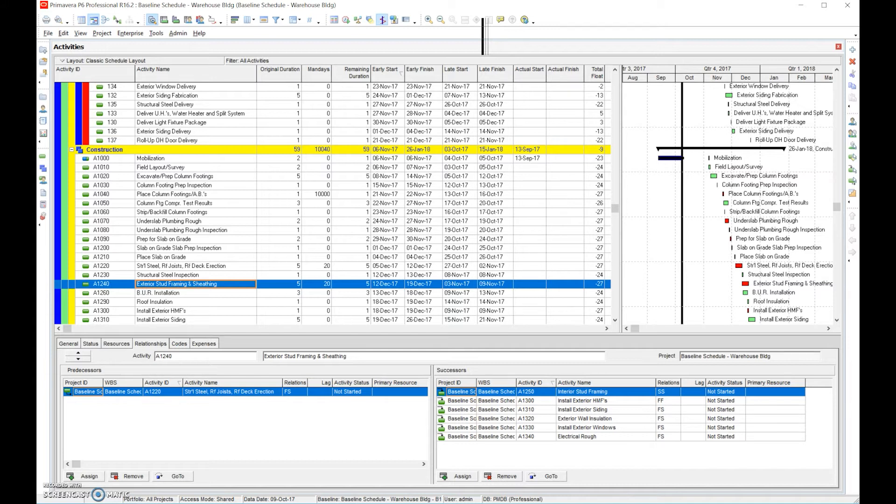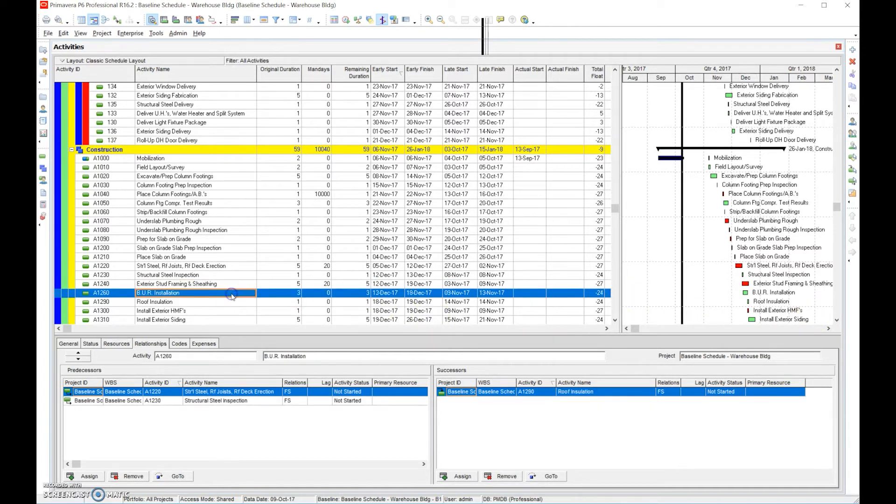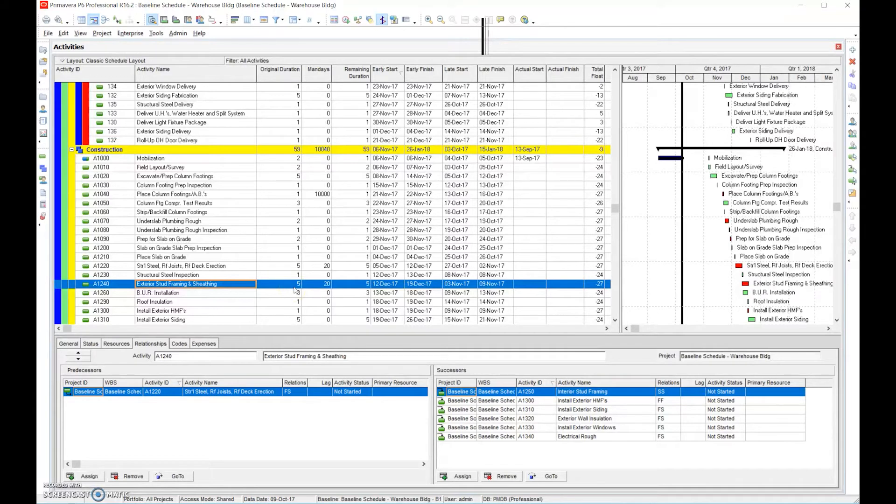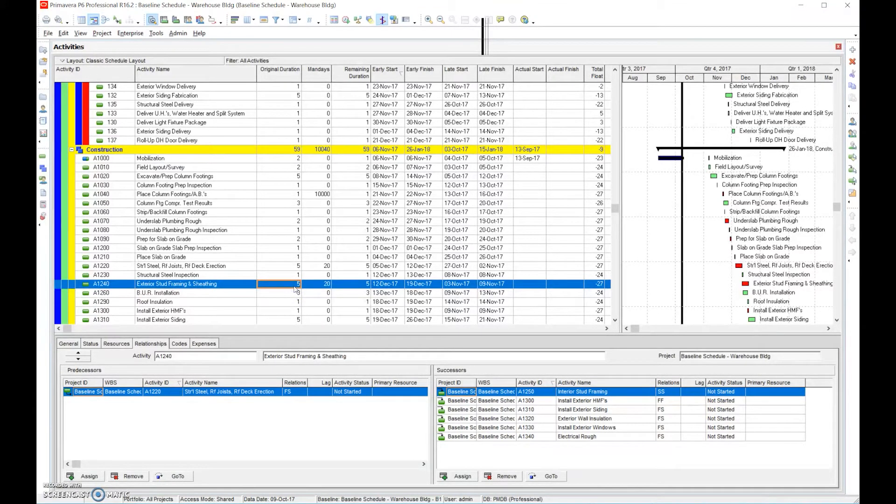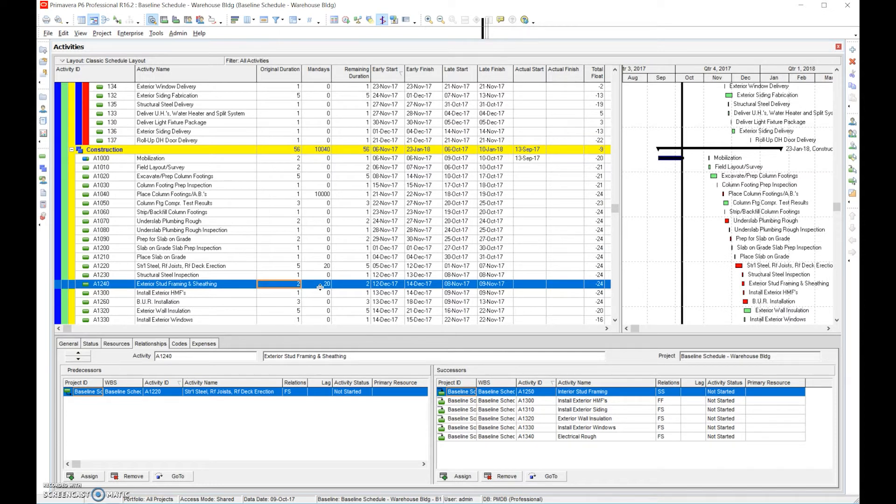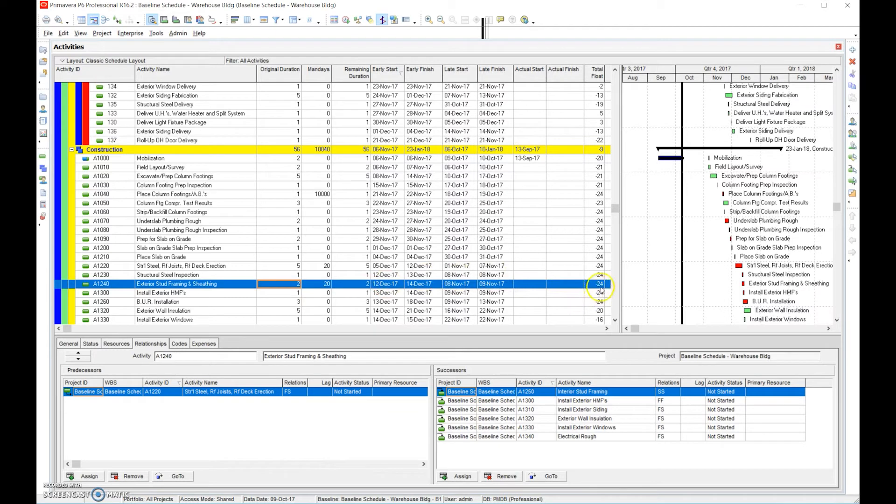We only want to focus on critical path activities that have long durations because focusing on an activity that has a green bar like you see there is not going to affect the critical path. So we want to focus nothing but on the critical path. Now remember the critical path will change. So say in this case here, we're going to exterior steel stud framing. Maybe if we double the crew size, maybe if we've got 10 people out there, we have 20 man days. We brought 10 people, we had 10 people per day. We could get it done in two days. So say that we talk with our subcontractor and we're able to get additional resources and flood the job site for those two days. We can increase productivity. You notice we move from 27 to 24.